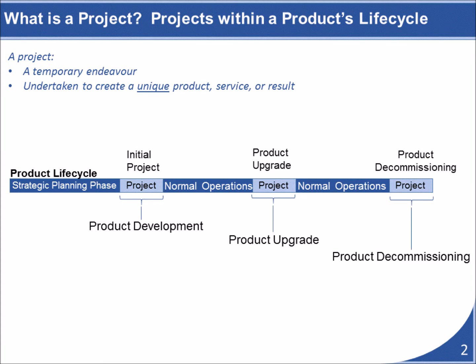A product's life cycle begins when an organization wants to create something new. They will launch a project to develop this new product. Once the product has been developed, the organization enters into what's called its normal operation phase where it's producing these products. While initially creating the product would be considered a project, the ongoing mass production of the product would not be considered a project as it is no longer a unique undertaking.